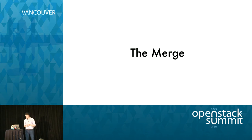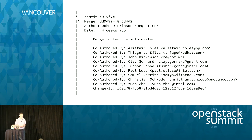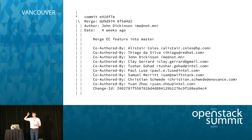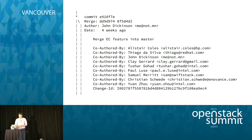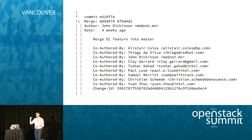When you get to the actual patch for merging Erasure Codes, it takes a lot of time to merge. One of the things we did was declare a freeze on master — nobody's going to touch anything else, everyone dedicated to this one integration effort. With Storage Policies, we made a mistake: we put the documentation right up front of the patch chain. The problem was it became a bike-shedding issue — someone would find a nitpicky typo in the docs and minus-one the whole thing, causing entire rebases and slowing everything down.